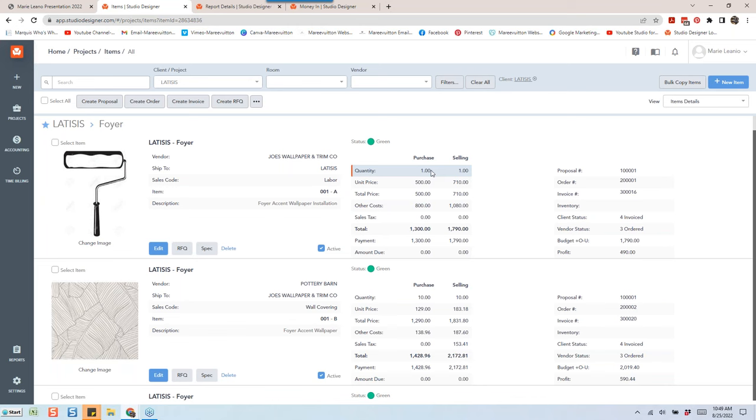What I like to do is I like everybody to ask for 100%. I know some people cringe at me saying that. Well, I'm gonna tell you this, when you don't ask for 100%, guys, and sometimes we have to pay the vendor 50 or often 100% to even start, you're basically funding their project for them. And that's something that I really have a hard time doing. So everybody that I work with, I just make sure we're asking for 100%, so there isn't a ton of cleanup on my projects at the very end.